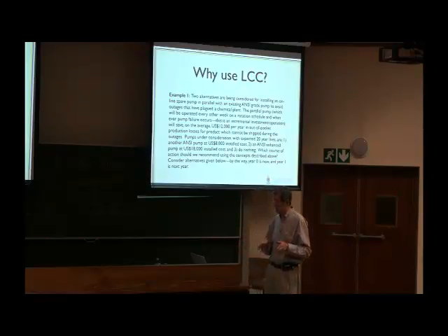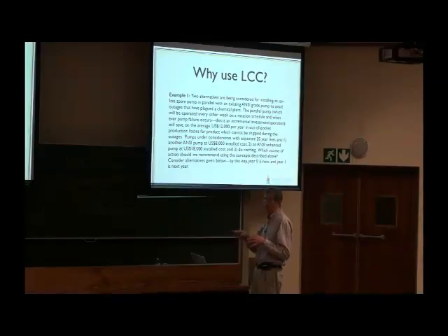So it is a standby pump. They say it's an online spare pump, and it would seem as if both pumps are online. That's not true. It's a standby pump. They say it will be operated every other week on a rotation schedule so that it can stay operative, can work well. So what they will be doing is using the spare pump, stopping this one for a week, and then changing over for the other week to the other one again, and so on. And also whenever pump failure occurs, that's logical. And so they will save $12,000.